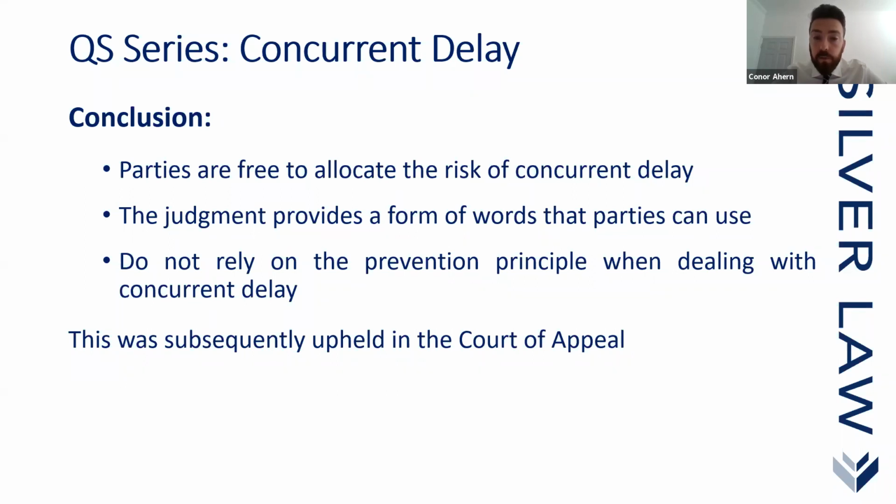One of the interesting points is that the judgment in North Midland provides the form of words that parties can use, and we regularly see that the words included in that clause have been taken and used in the standard form, which makes sense because it's been judicially upheld.